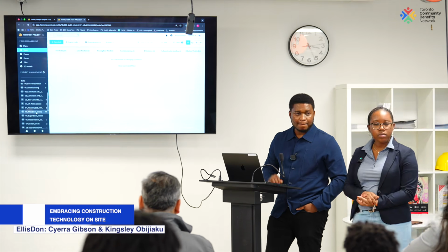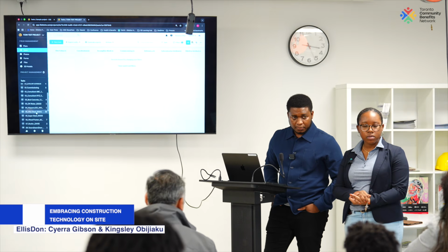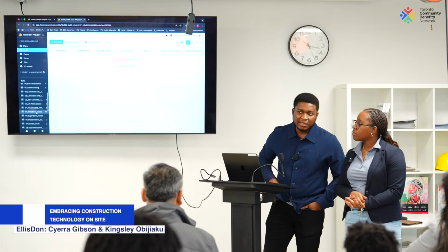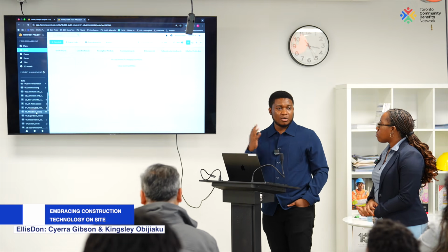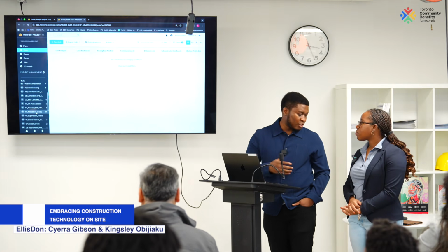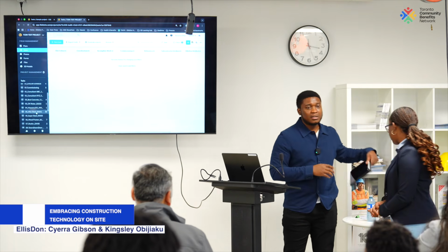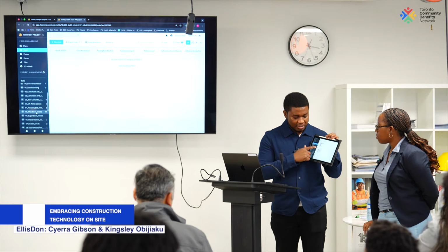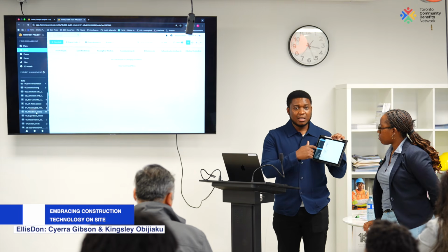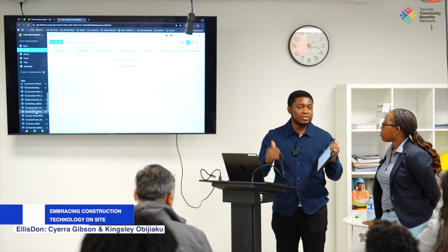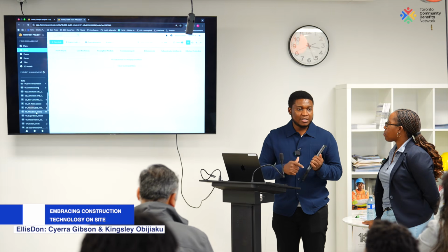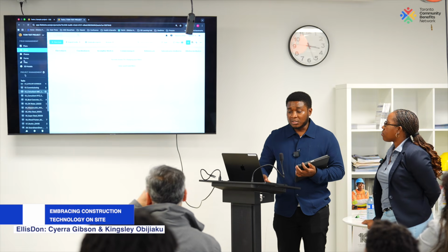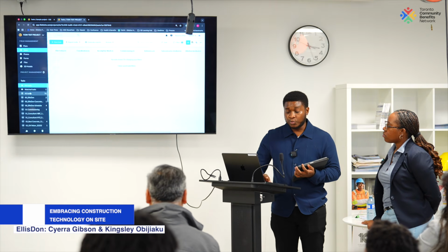Is this information manually entered, just say we're gathering about deficiencies? Deficiencies have to be entered manually. So again, depending on the size of a project, we have a QA/QC person on site. They just walk around with an iPad with Fieldwire on it. We have the tool on the iPad as well. So you basically just go in and create a task and enter each punch list item. So if something wasn't done correctly or to standard, you just enter it as a deficiency and I will assign it to the sub.